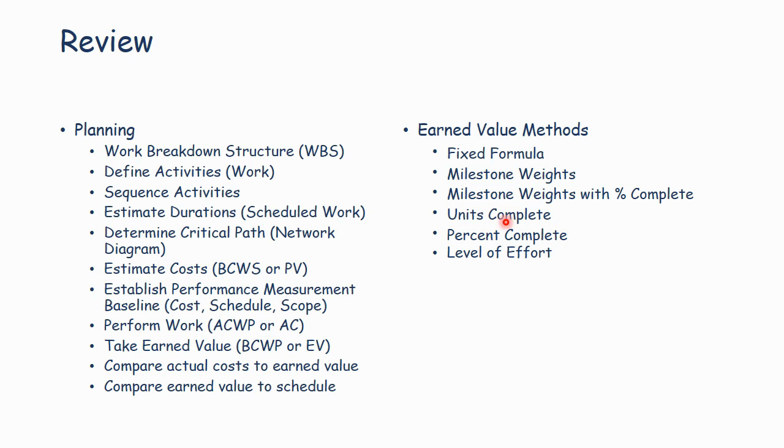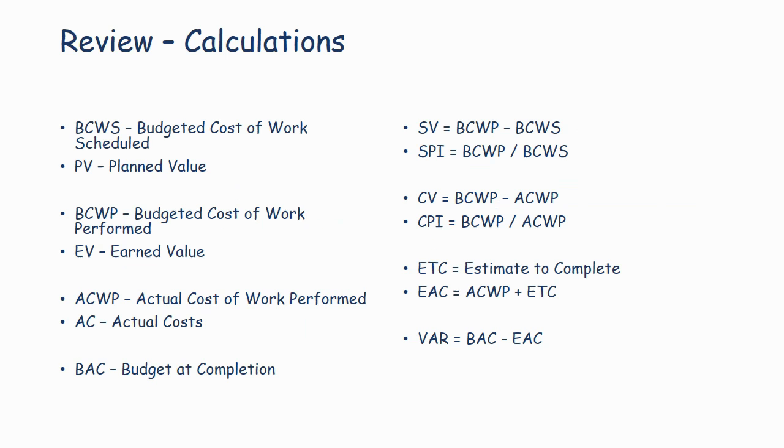We can do percent complete, which is similar to units complete, where we assess whether we're 10, 20, 30, 40, 50% complete on a task. And level of effort, where we just lay out a budget over time and we earn value as time elapses.